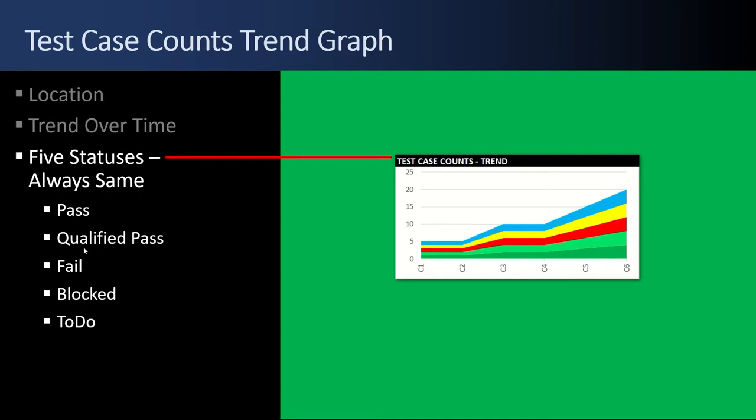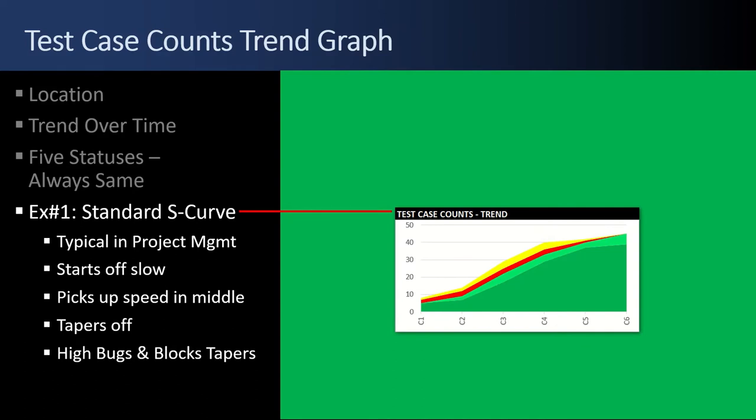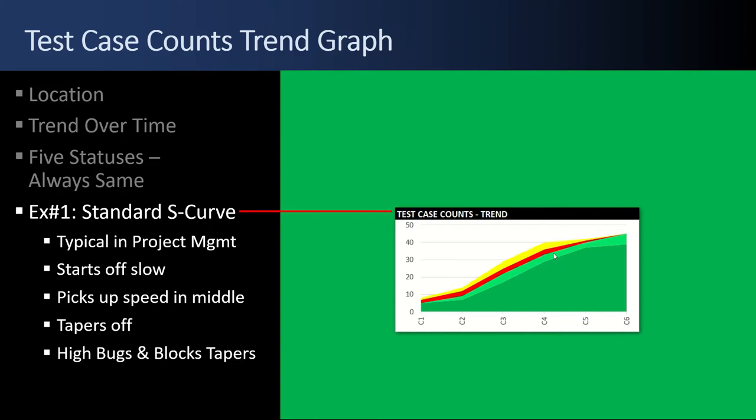Passes dark green. Qualified pass light green. Fails red. Blocked is yellow. To do is light blue. Example number one is just a standard project S curve. Starts off slow, picks up fast in the middle and then slows down at the end. There's some high bugs in the beginning, a bunch of bugs in the middle, and then it tapers off to nothing. Same with the blocks.